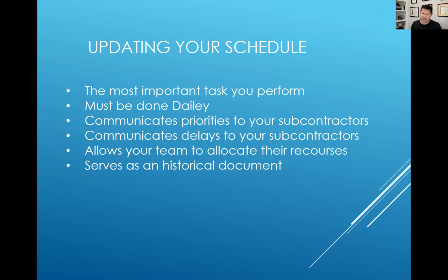All right, let's talk about updating your schedule. The most important task you perform is updating your schedule. Absolutely. It must be done every day. Daily. It must be performed every day, at a minimum once a week, but daily is preferred. It depends on the complexity of your project. Maybe once a week is okay, but your schedule needs to be looked at every day.